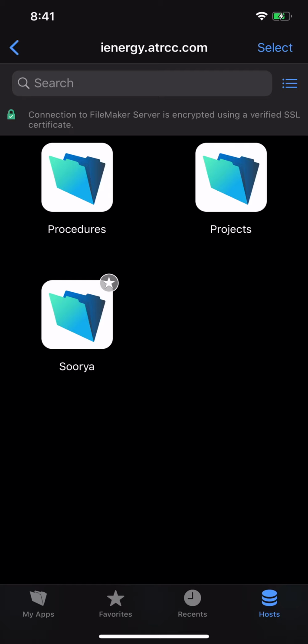This video is to help installers understand their obligations with regards to information iEnergytech requires for a job to be determined as being complete. So of course we know that an installer has to supply a CES, has to carry out testing and commissioning, perhaps basic training and handover, fill out an EWR form, solar connection form, get the customer signature for the STC assignment form if that's relevant.